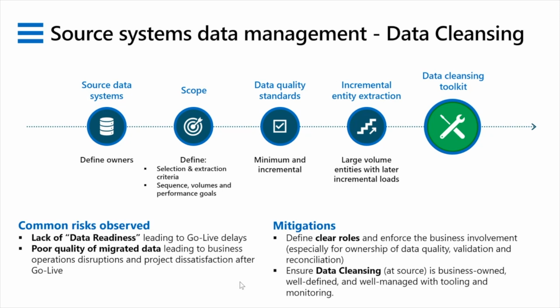Of course, sometimes that is not possible, but you should do everything you can to try and fix the problem as close to the source as you possibly can. And for that, you need to have a very clear definition of this customer record in this legacy system. If it does not have these attributes, we are not picking it up.